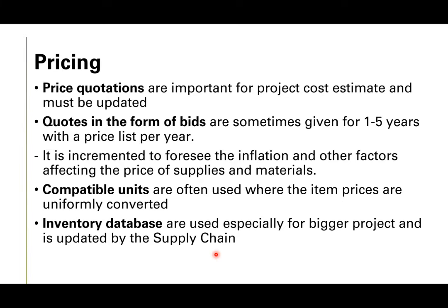Now, let's talk about pricing. Price quotations are important for project cost estimate and must be updated in order to have a good and fair cost estimate of the project. Quotes in the form of bids are sometimes given for 1 to 5 years with a price list per year. It is incremented to foresee the inflation and other factors affecting the price of supplies and materials.